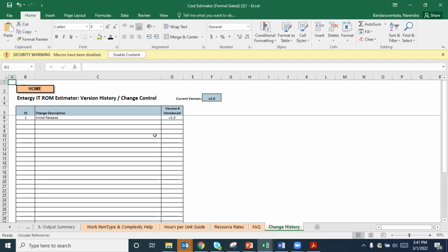I have refined my cost estimates. I'm good. I don't need additional dollars. Excellent. Keep moving on. If you need additional dollars based on the scope of the work that has come to a design stage, and you understand the design better now, then you need to put in a justification document that automatically brings in the cost estimator tool. So this may be helping you at that level.